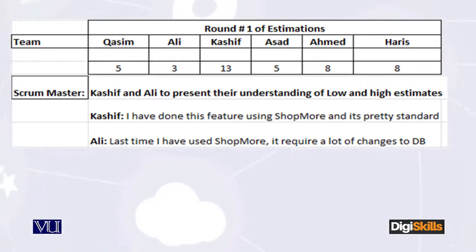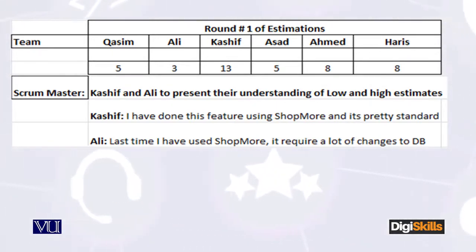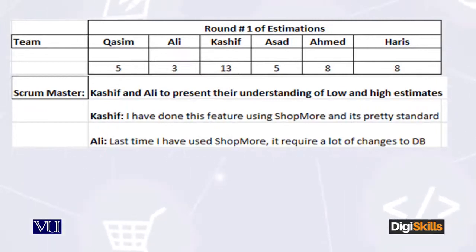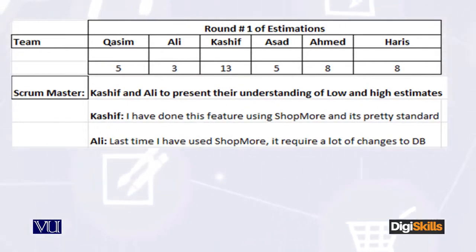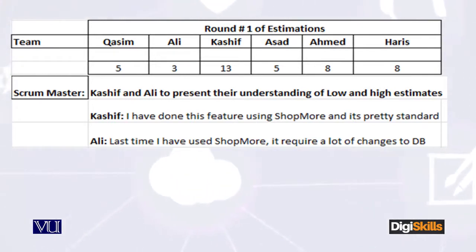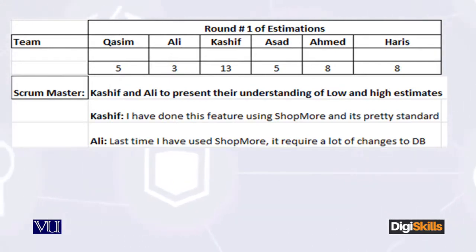Ali explained that he gave a low estimate because he has done something exactly like this before — he knows what to do and how to do it, so it's simple for him. Kashif says that the last time they worked on something similar, there were significant database changes required, which is why he gave a high estimate. A discussion follows and some requirements become clearer.